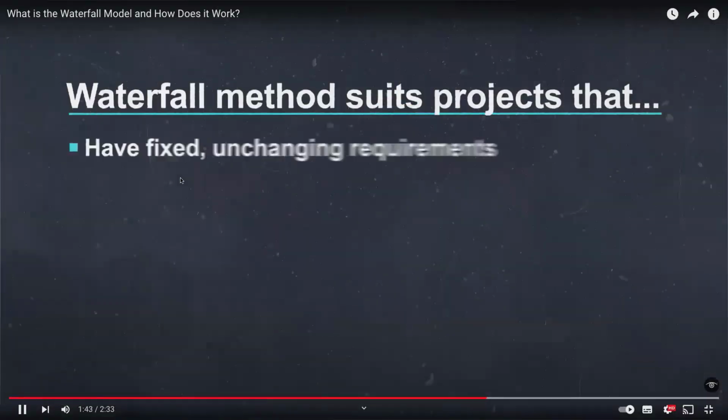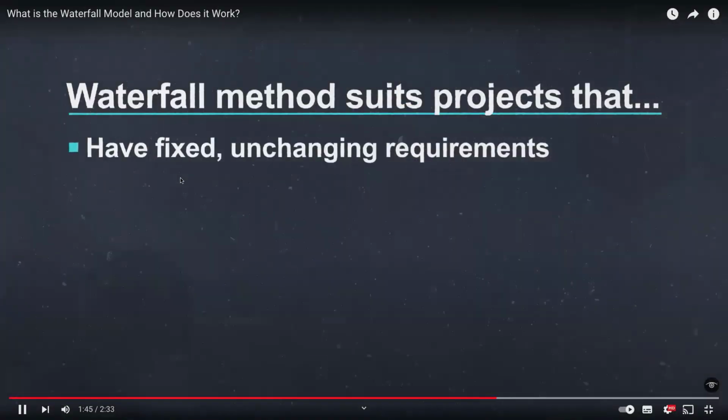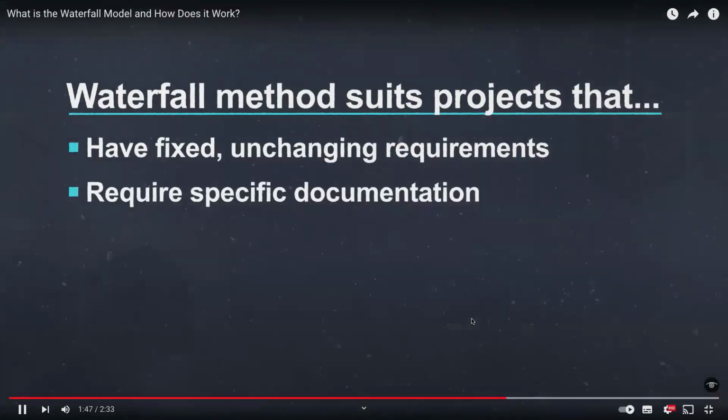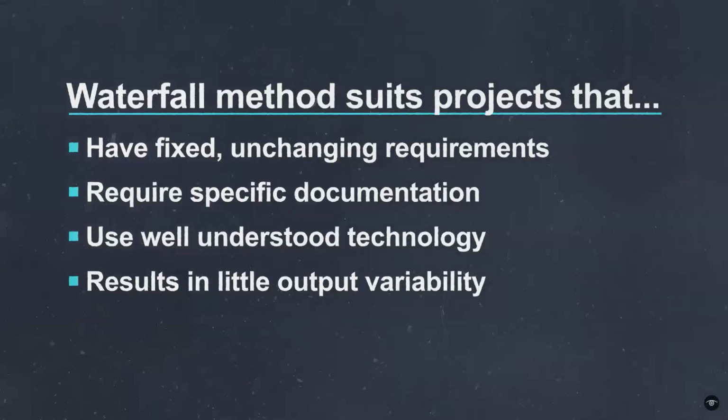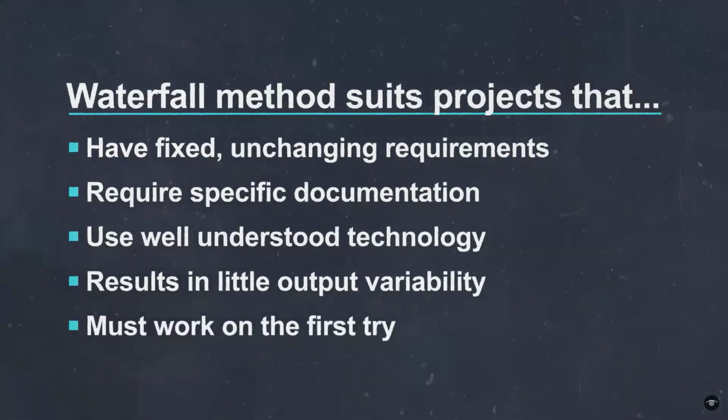The waterfall method lets development teams move efficiently through the phases of a project without much input or interruption. This makes it suitable for projects that have fixed, unchanging requirements, require specific documentation, use well-understood technology, result in little output variability, and must work on the first try.